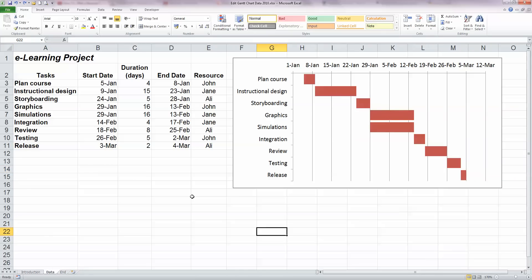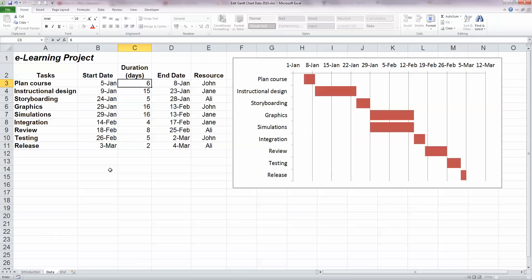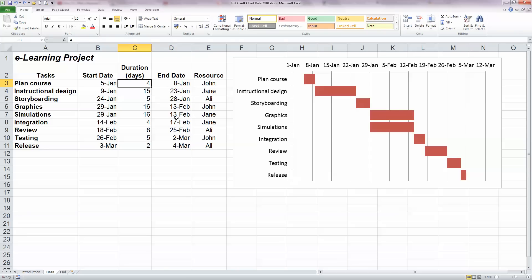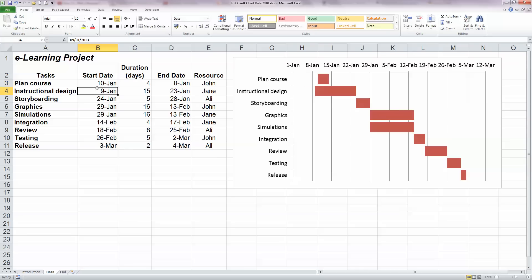And the first thing I want to do is I want to link the end dates with my start dates. And the reason I want to do this is, let's say for example in my chart here, I want to change the duration of the planned course task, the first task from four days up to six days. So if I just type in six to overwrite the four here, what happens is that the end date, which was the 8th of January, remains the 8th of January and there's no change there. So just let me change the date back to four. If I change also the start date from the 5th of January to let's say the 10th of January, we can also see that our end date remains as the 8th of January here. So I'd like to be able to link that and automatically update the end date if I change the start date or the duration. So let's undo that change there.